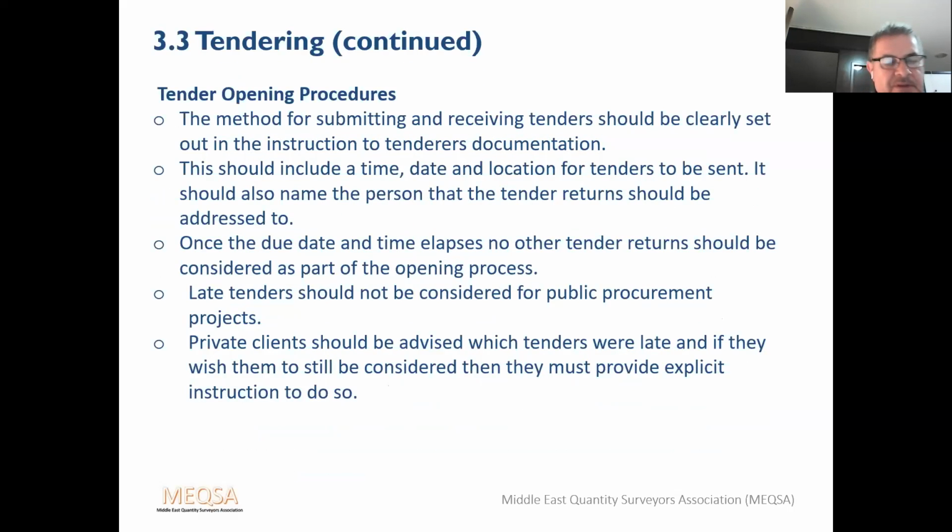Now, what happens when the tenders are returned? Tender opening procedures are usually, especially in the public sector, very strict. The method for submitting tenders should clearly set out the instruction to tender documentation. It should include time, date, and location for tenders to be sent. It should also name the person that the tender return should be addressed to.